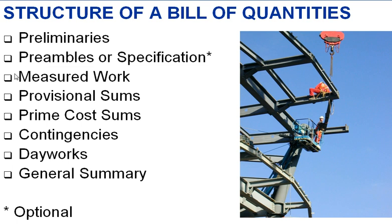Then comes the main body of the measured works, measured using a standard method of measurement such as the ARM. Next we would have a listing of all the provisional sums. Provisional sums account for items which may not be measured fully at the time in which the documentation is put together — these would be cited as provisional items. Next we have prime cost sum, which is a sum of money provided for the employment of nominated contractors or suppliers nominated by the client.